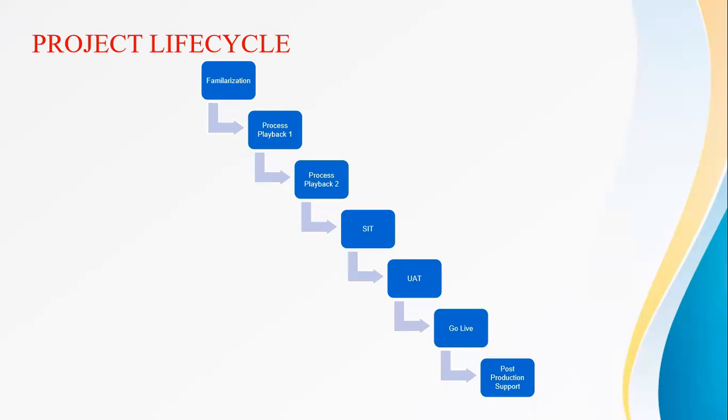As part of the contract, it will be mentioned that once go live, there will be production support for 1 month, or say 2 months. We will provide production support in case any issues come up, work on those, and provide resolutions. So as part of the process, you have the post production support.